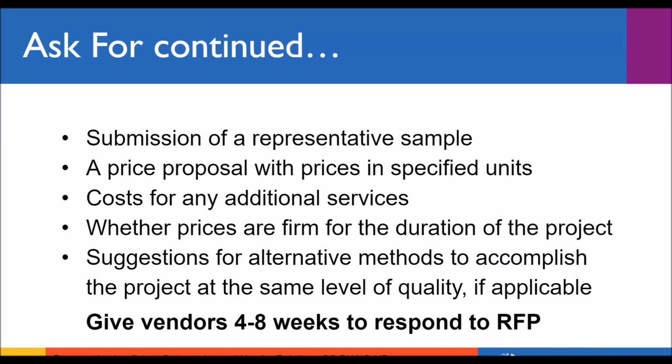So Dale recommends that organizations distributing RFPs budget 4 to 8 weeks for a response. So consider that if you're requesting quotes around the end of a fiscal year or to use fiscal year money, or if you're going to be using this in a grant proposal, there are probably a lot of other organizations that are doing the same thing. So you want to give both yourself and the vendor plenty of time to prepare a thoughtful, accurate proposal and to ensure that you have enough time to review that proposal, ask any questions of the vendor, and include your final decision in your grant application.